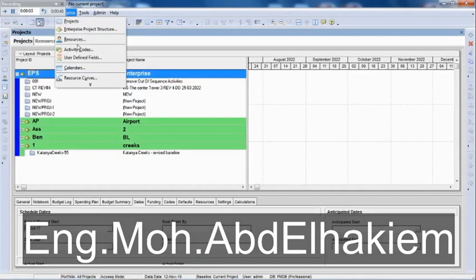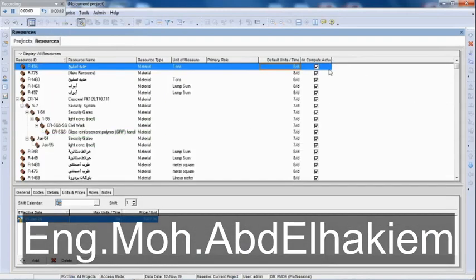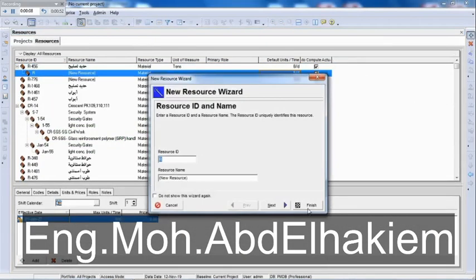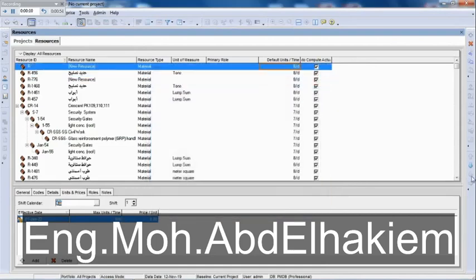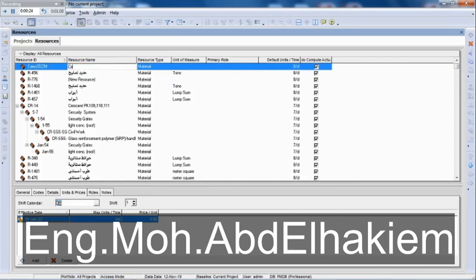The first step is to go to the Primavera program and add three new resources which represent the three main types of resources: a resource with materials type, a second resource representing labor, and a third resource classified as equipment. Thus, three main lists will be formed under which all the resources in the project will be included according to each type.